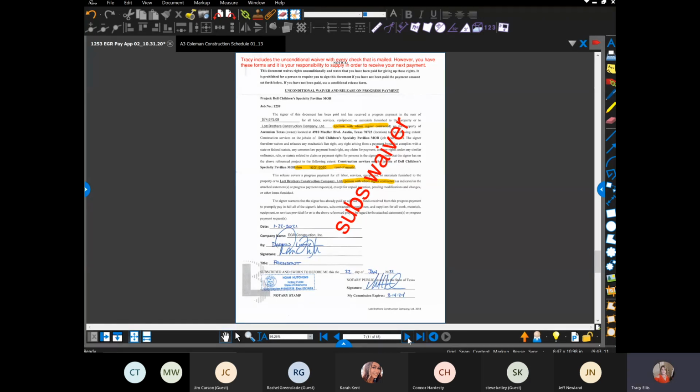And this is an unconditional. This one I generally will send when I mail you your check. But again, you have this form in your packets, and it is your responsibility to get these back to me, stating that you did receive your money and you were paid, in order for the next payment to come.